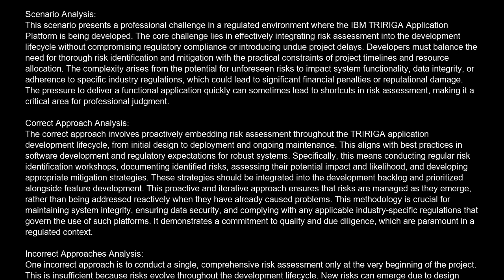The correct approach involves proactively embedding risk assessment throughout the TRIRIGA application development lifecycle, from initial design to deployment and ongoing maintenance. This aligns with best practices in software development and regulatory expectations for robust systems. Specifically, this means conducting regular risk identification workshops, documenting identified risks, assessing their potential impact and likelihood, and developing appropriate mitigation strategies. These strategies should be integrated into the development backlog and prioritized alongside feature development.